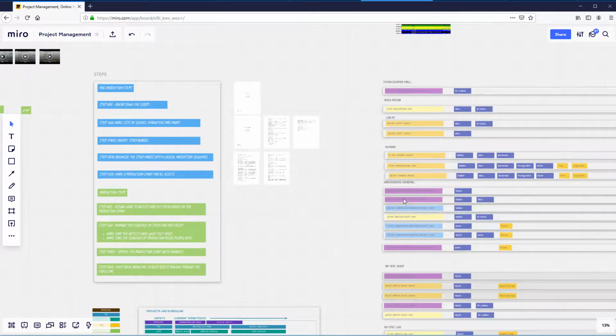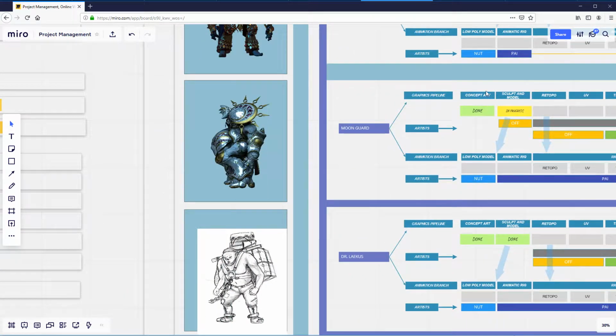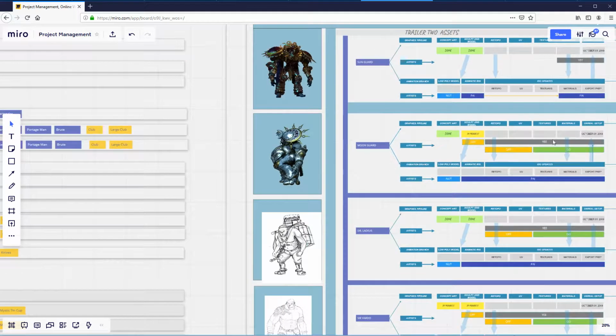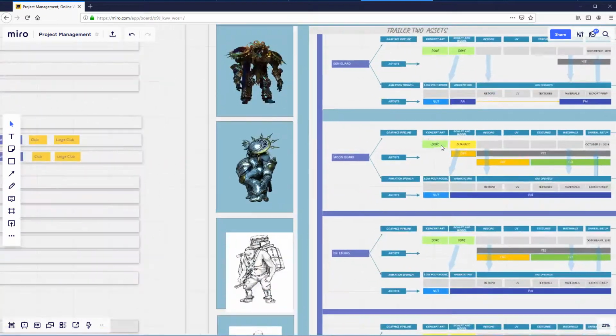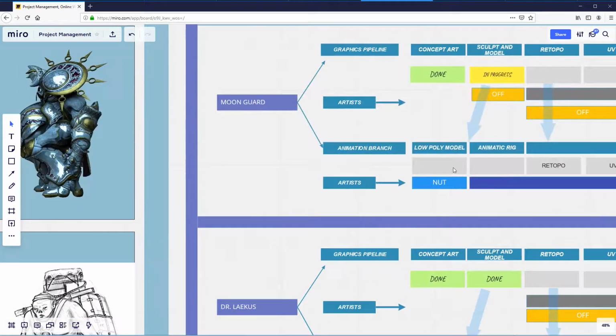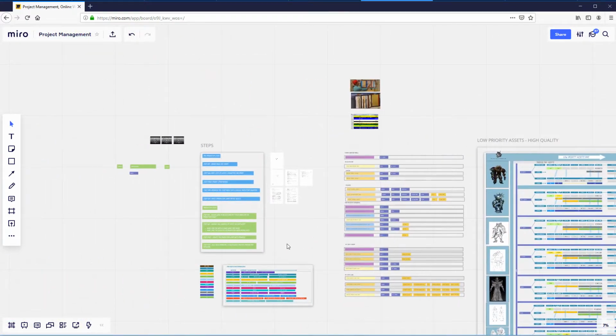Another way that works is what I described in the last video, which was this parallel production. Keeping the animator busy while these guys are producing, that's important. We don't wait till we're all the way done and start animating, right? While we're doing textures and other things, we already have a rig. This guy's rigging while these guys are doing retopo and UV. And Nut is making these lower polygon versions of everything, right? That's how that works, to keep people busy.